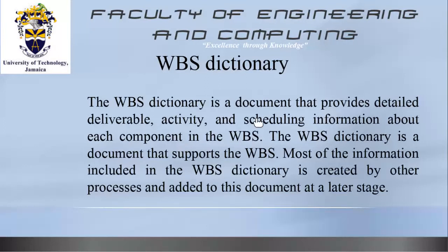So you have done the WBS, you have broken it down, and you say, yes, I am at a place where I can determine duration of activity. How long is it going to take to do each activity? I know the skill sets that are required to do it. I can assign resources, meaning I know the equipment I need. It's going to need a backhoe, and on average, a backhoe is going to take 5 hours. So I need a backhoe driver, or the cost for the backhoe is going to be this over the entire period of time. I also know that I need a truck to cart away debris.